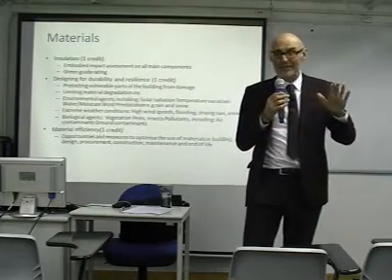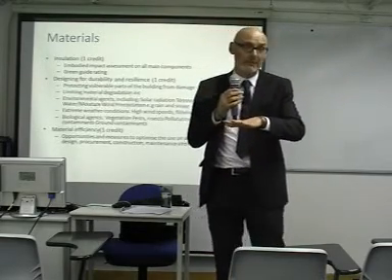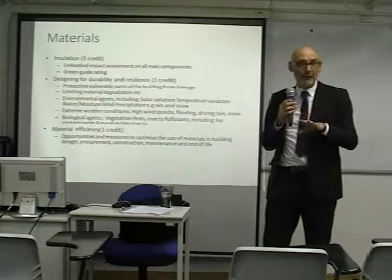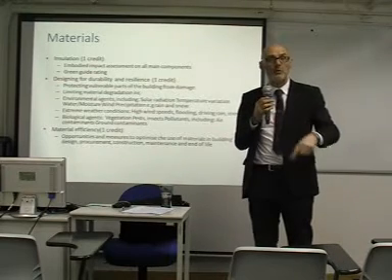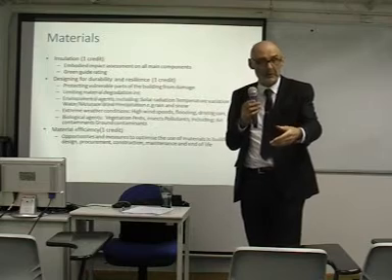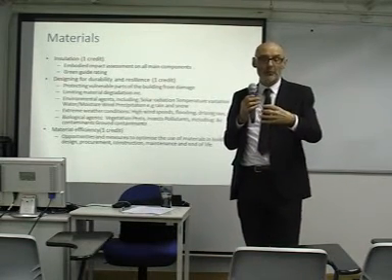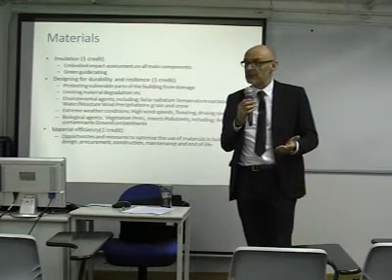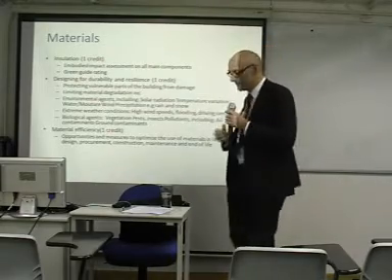So there are no fires on the site. The skips really have recycled materials in them. They don't actually have waste to landfill. Our landfill taxes are very high in the UK, so we don't put anything in the ground anymore. We recycle the materials. BREEAM has helped us do that because you can actually pre-cut your materials to go into the building. Our roofing materials are all pre-formed. So you can have quite complex shapes, but they're pre-formed by computer-aided design, therefore you reduce your wastage.